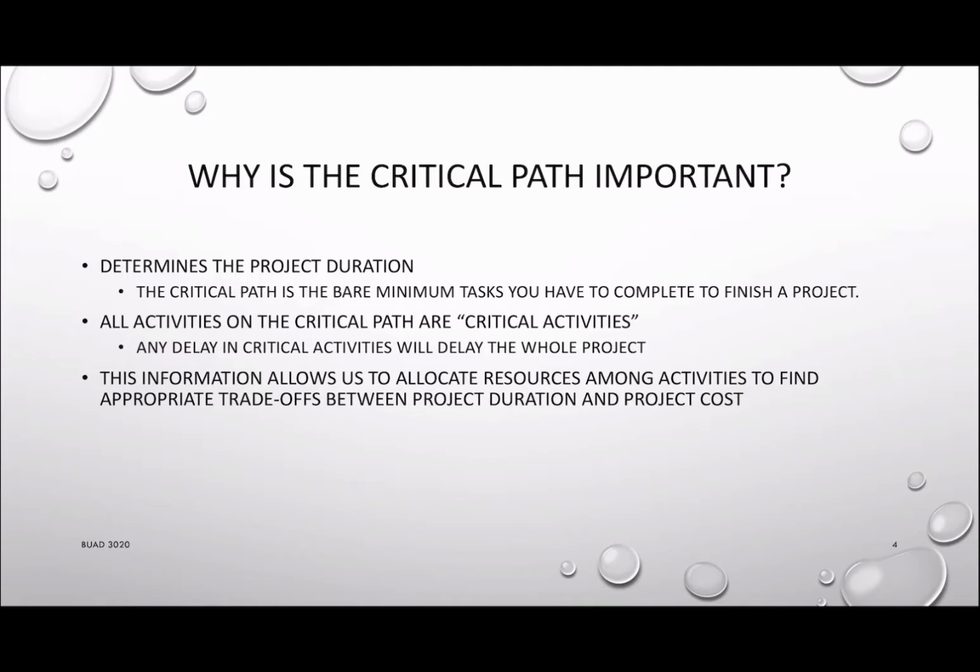And once you have a critical path, you can also determine what the project duration will be and what the minimum time required for you to finish the project will be. So it is very important for you to identify the critical path, because once you know that, you can identify which activities can be shortened if you want to invest some money to improve the progress.